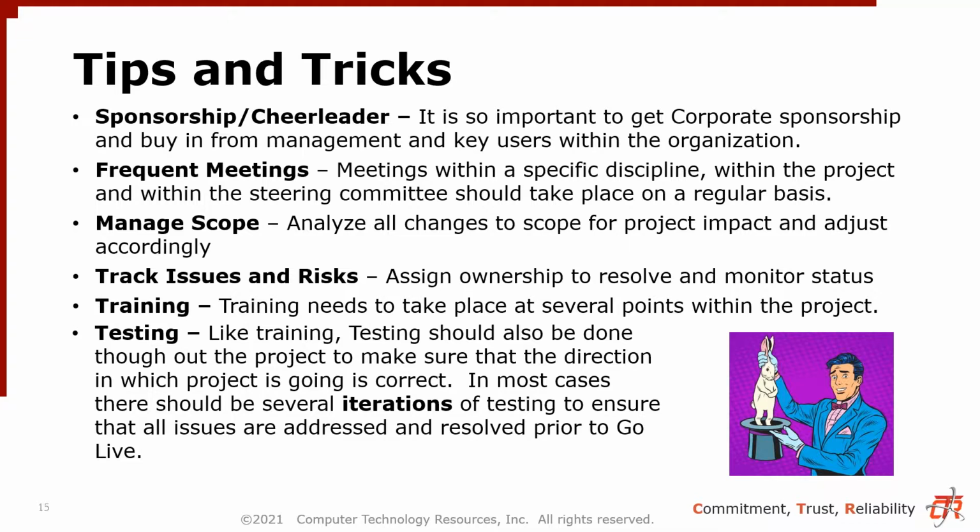Managing scope, you all know about scope creep. Something starts, and then you need to have this, and then you need to have this, and all of a sudden you're looking at third parties, bolt-ons and stuff. It's important that you meet those needs, but it's also important that you keep the project manageable. If you can push things off to a phase 2 because they don't impact your go live or the initial part of success, then you do that.